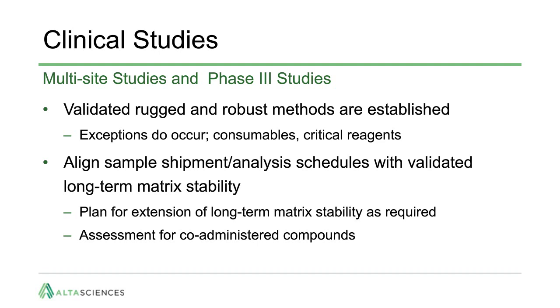For studies with a long duration and multi-site studies, sample shipment and analysis schedules should be considered in terms of the validated long-term matrix stability. Extending the stability as the program progresses to reduce risk is recommended and not leave this assessment for study end. As programs expand with different types of clinical studies, the methods and validations need to be evaluated for suitability. As an example, the impact of co-administered compounds.